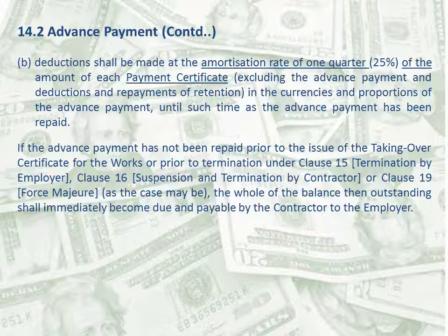In case where advance payment is not specified in the appendix to tender, then this subclause will not apply. In such situations, the good practice is to strike through this clause and insert not applicable in the particular conditions. As we already discussed, the advance payment is recovered through percentage deductions in payment certificates. The recovery percentages must be given in the appendix to tender.